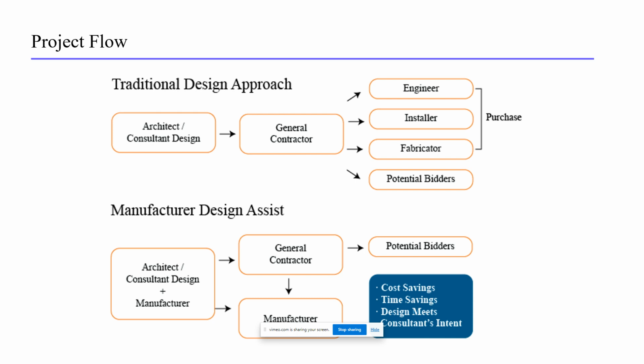Just to be clear, this process does not circumvent the standard bidding process. Although it's true that there are certain projects that are awarded directly, bidding remains a viable option for the design assist approach. It's just that you hopefully have a better design up front. You provide that 3D modeling, budgeting, etc. The manufacturing partner benefits by having a clear understanding of the scope and expectations, and they can manage their budget accordingly. Positive result of this approach is that you get a design, again, that is more in line with the budget and more in line with the aesthetic when it's all said and done.